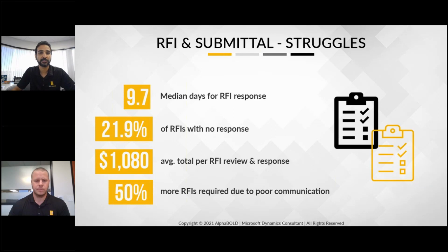RFI and submittals. As you all know, they are probably very, very important. They're important from the execution standpoint. They're also important from having everything documented standpoint. You can see up here some statistics again, 9.7 median days for an RFI response. And even after that, there are so many RFIs that are left unattended and without any response, 21+% for that.